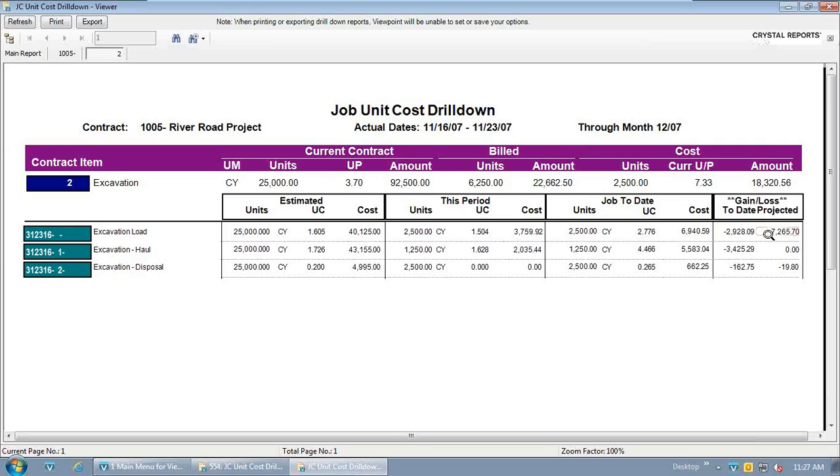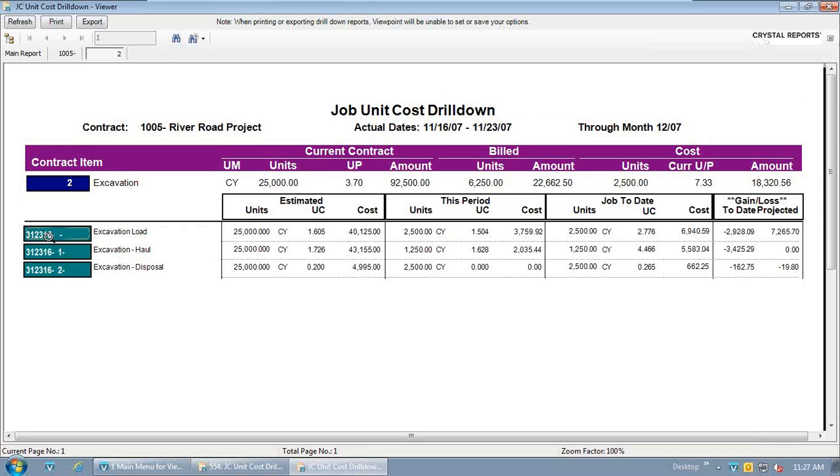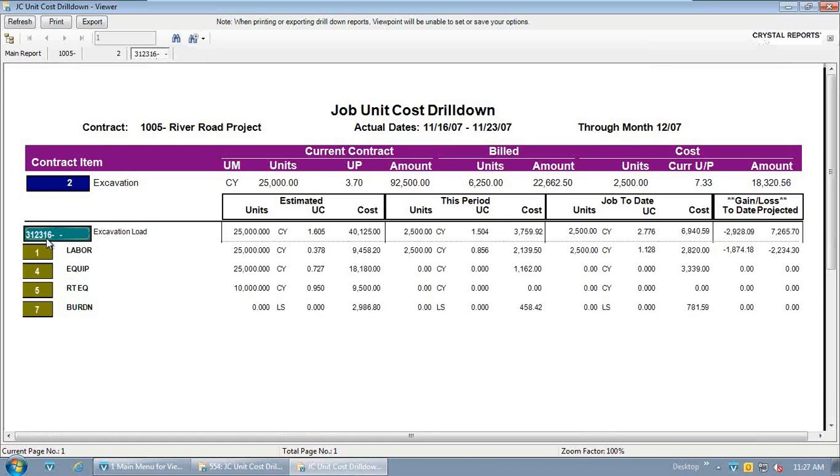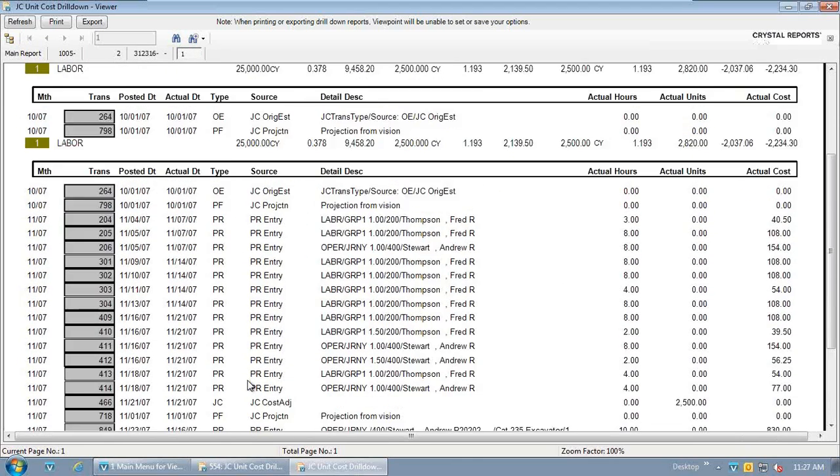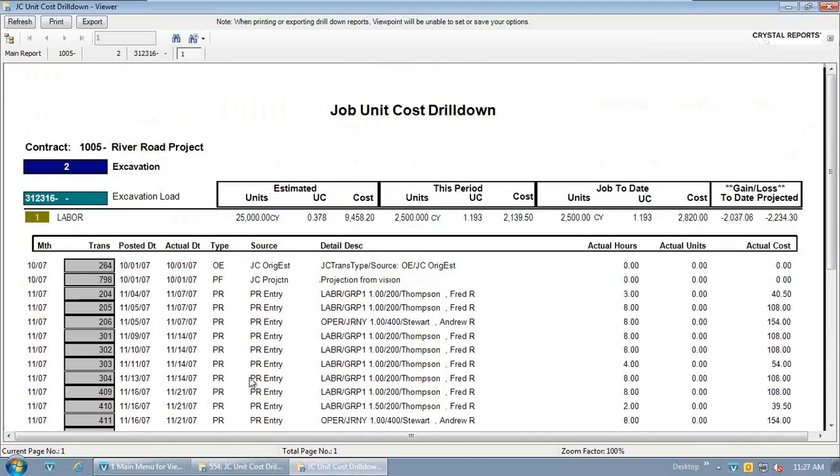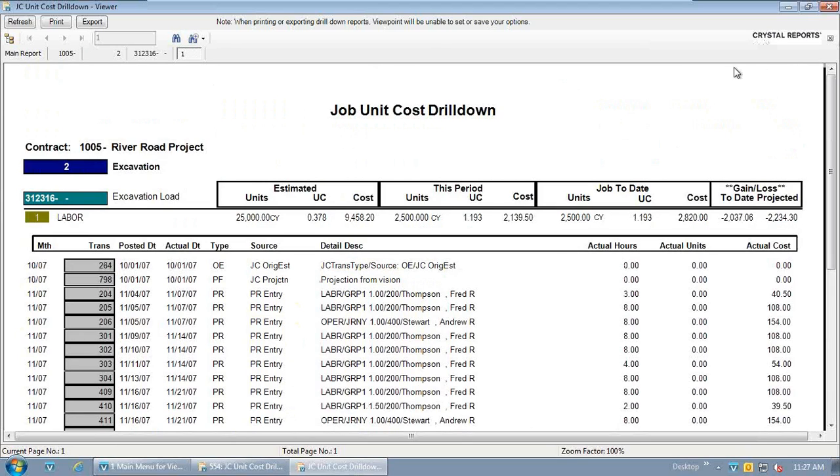And the other component of that is showing you the gain loss over your estimate as well as over your project manager's projected final cost. So along with being able to track commitments and the actual cost against the job, we're also tracking that projected quantity. And that projected quantity comes into play typically on a weekly or monthly basis to helping to make sure we're accurately forecasting the projects. So the entire structure is available for you here. And as you drill into labor or equipment or one of those other items, you're going to get down into the actual transactions if you want it. And if you're associating any timesheets or invoices in the system, you'll be able to access them right from here.